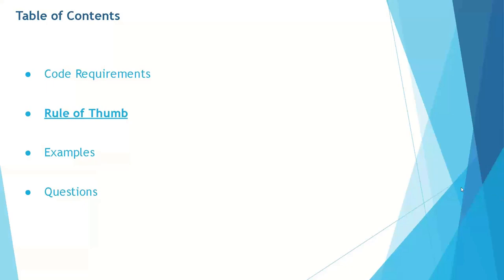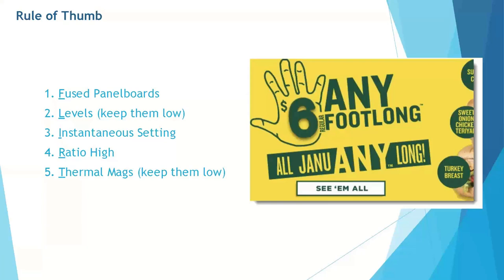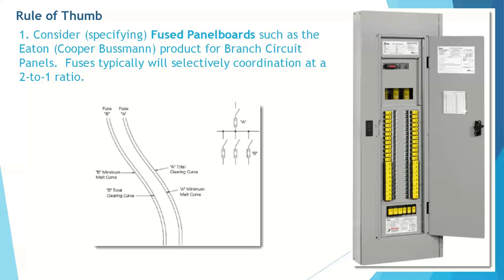In summary, the NEC requires selective coordination across the full range of time, typically understood to be down to 10 milliseconds or 0.01 seconds for both the normal and alternative source. This requirement can be costly to meet and will also require different system topologies than the days past. Often switchgear and breaker changes can become extremely expensive, especially during construction, which we have experienced many times this year. Moving on to the rule of thumb, I'm going to give you five rules of thumb for building selectivity into the design of your power system.